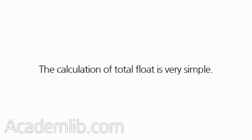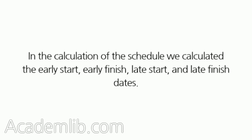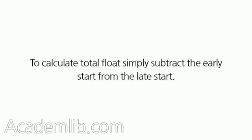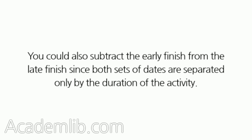The calculation of total float is very simple. In the calculation of the schedule we calculated the early start, early finish, late start, and late finish dates. To calculate total float, simply subtract the early start from the late start. You could also subtract the early finish from the late finish, since both sets of dates are separated only by the duration of the activity.